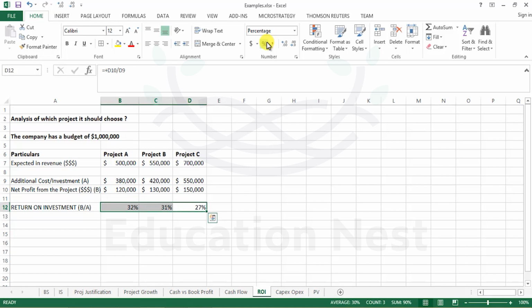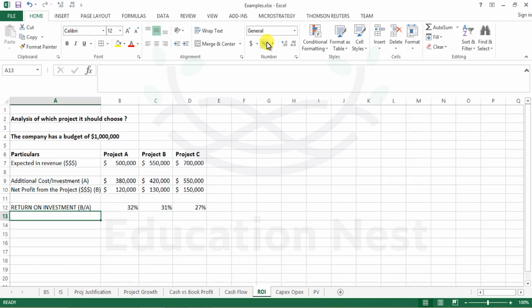And mark this, all the companies have an internal predefined set of return on their investment. Let's say if your project generates 5% return on investment and the government bonds are giving a risk-free return of 7%. In that case, companies won't even consider your project. They'll directly put the funds which they can allocate to your project in the government bond because those are risk-free investments which are guaranteed to generate a 7% return compared to your project which is only generating 5% in terms of financial policies. So that was all with regard to the importance of ROI, return on investment.